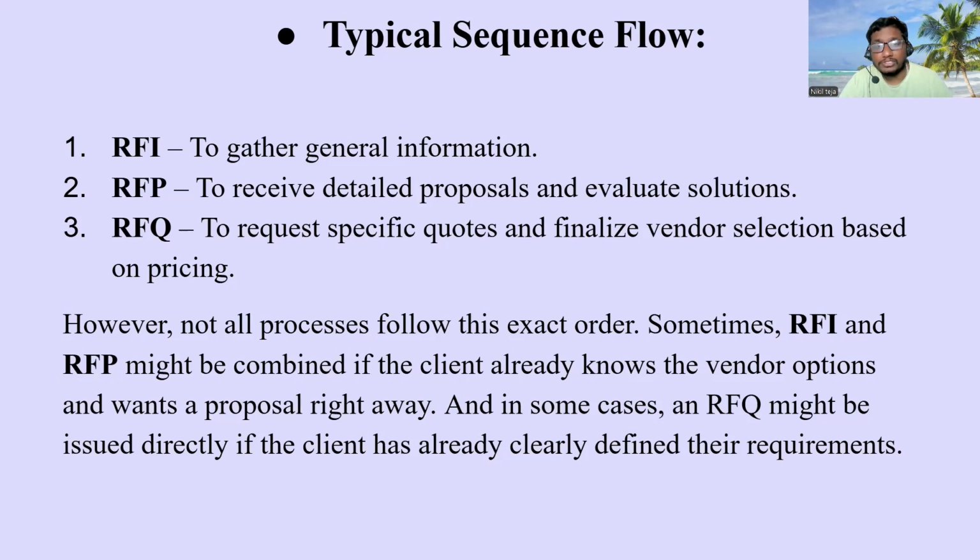Not all processes follow the exact order. Okay. Sometimes RFI and RFP might be combined if the client already knows the vendor options. You understood, right? It's quite intuitive. Sometimes the client will be sending the RFI and RFP combined if he already has the vendor options.